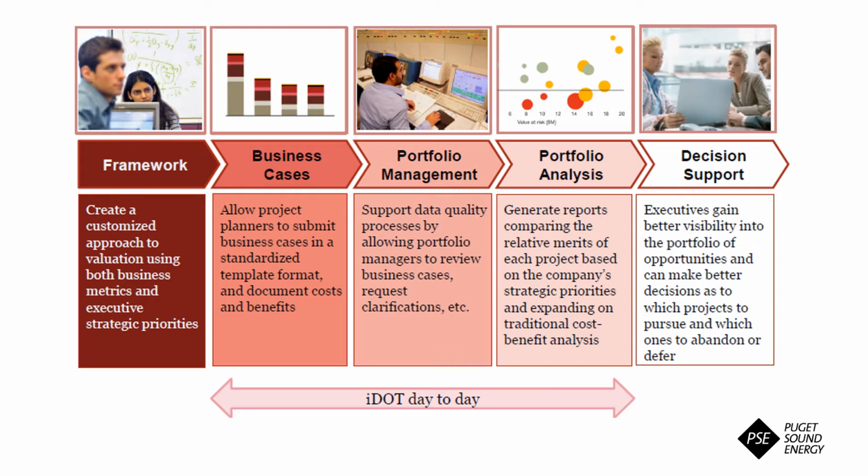Using a standard method for converting benefits, costs, and risks into a net present value allows a diverse set of projects to be compared and provides transparency to the process for stakeholders. The optimization engine allows for an efficient allocation of the budget so that the maximum value can be achieved with the available funding.